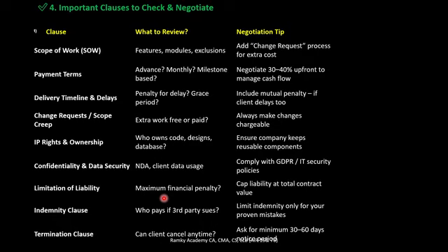always looks for any kind of things not delivered as promised in the contract. They have a right to charge 100 times or 200 times the contract price. We should not always look for that. We always cap our liability at a maximum of 12 months fee payable. So this will protect the risk in the contract.